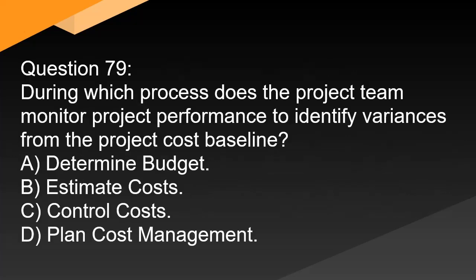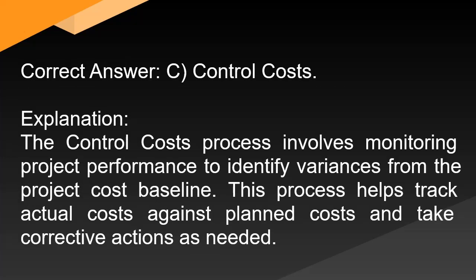Question 79: During which process does the project team monitor project performance to identify variances from the project cost baseline? A. Determine budget. B. Estimate costs. C. Control costs. D. Plan cost management. Correct answer: C. Control costs. Explanation: The control costs process involves monitoring project performance to identify variances from the project cost baseline. This process helps track actual costs against planned costs and take corrective actions as needed.